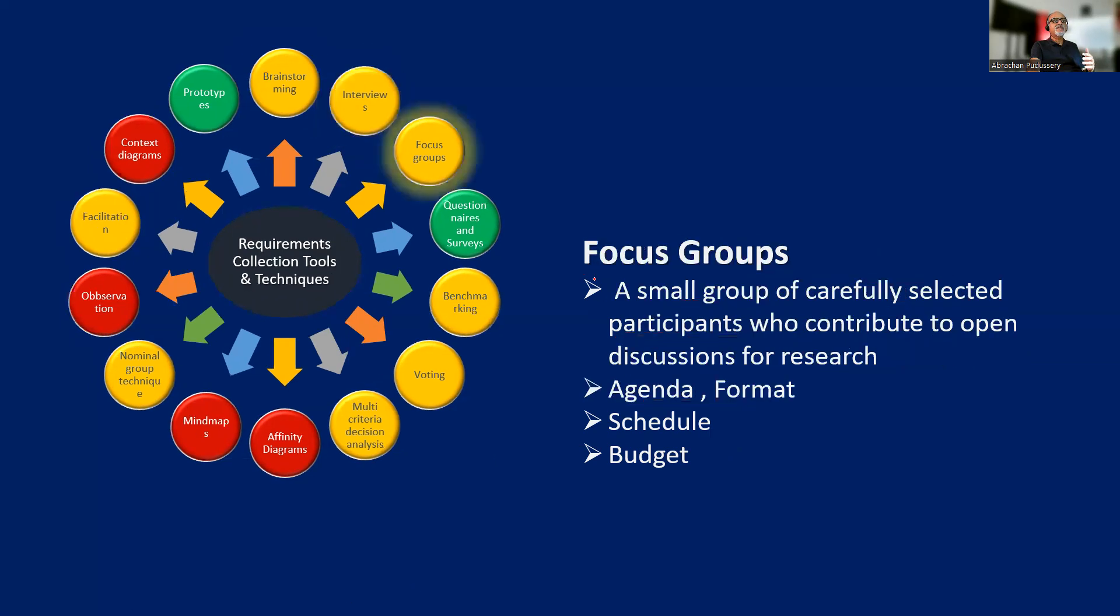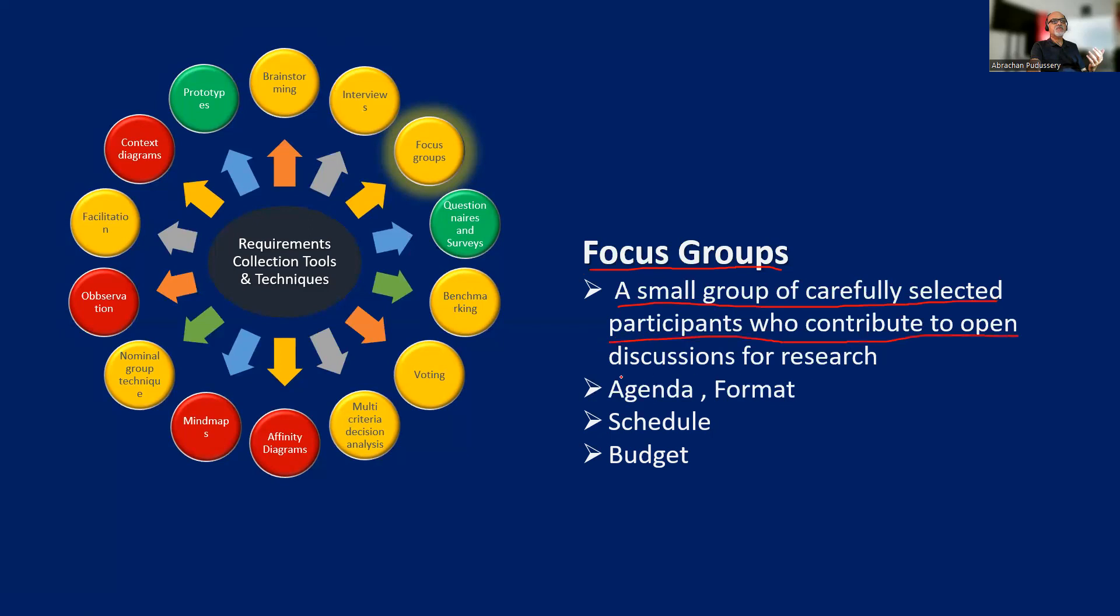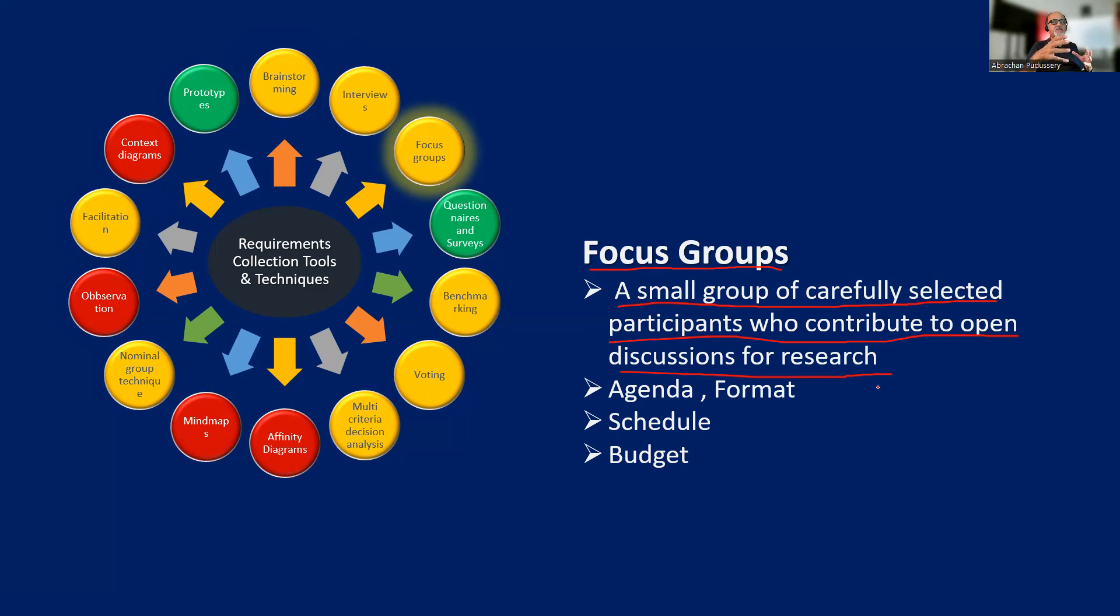Then focus groups. It is more like a task force, a small group of carefully selected participants who contribute to open discussions for research. This is a group of domain experts coming together to discuss about a problem. And again, for focus group, there should be an agenda and format, a start time and end time, and there should be budget allocated for it.